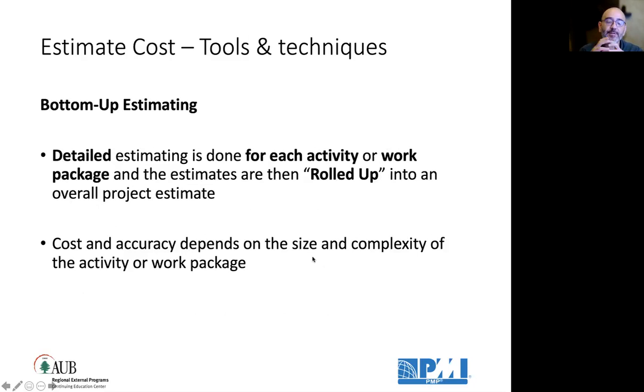Bottom up is the most accurate, and if you don't use bottom up, meaning we estimate every activity in the schedule, we will not be able to use earned value analysis. Here, we're going into details of estimating every activity by estimating the cost of every resource assigned to this activity, and the groups of activities are aggregated into components automatically, eventually up to the project final budget.